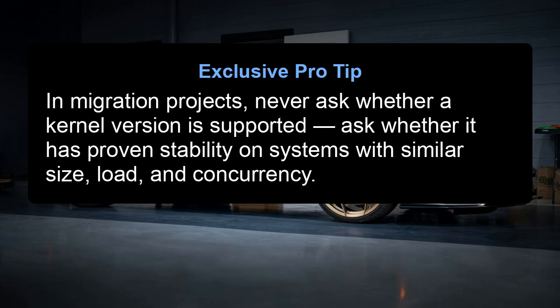Exclusive pro tip. In migration projects, never ask whether a kernel version is supported. Ask whether it has proven stability on systems with similar size, load, and concurrency.